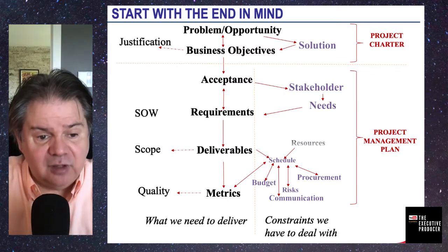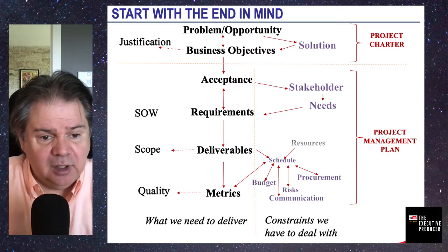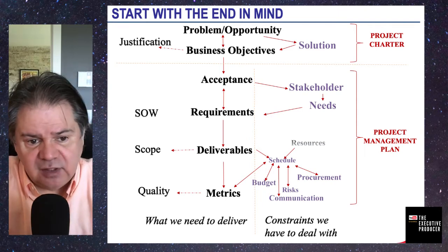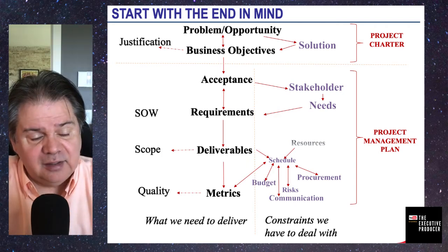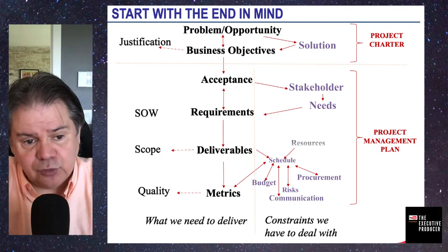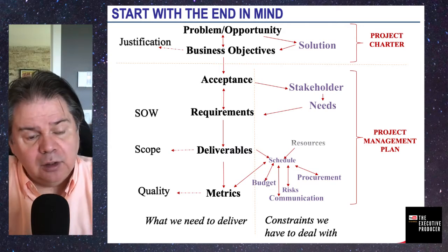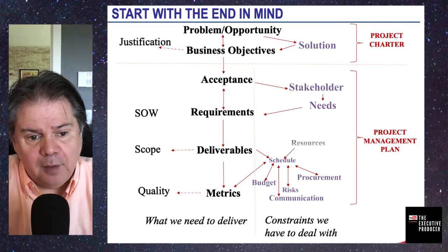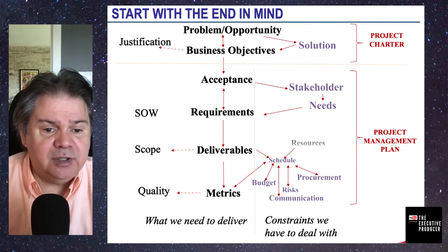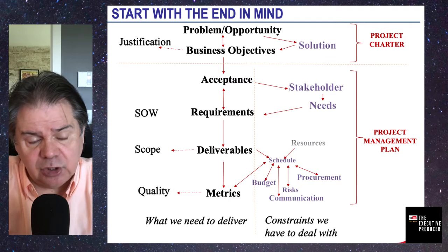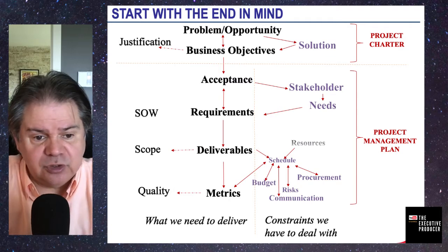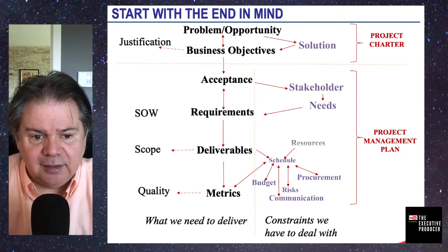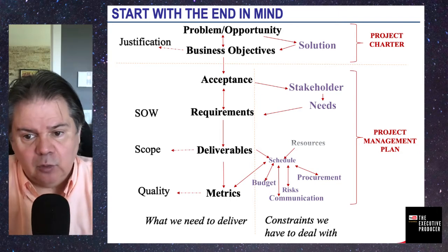So now what I need to identify is how I'm going to be delivering this output, and that's what the schedule is, okay? A series of activities that we need to identify. Activities take time, you use resources, and we will map these activities and put in the dependencies. After that, we will be able to assign resources to them, then establish effort and duration on these activities based on the resources that we have, and then come up with a network that we could look at and find what's critical, what's not critical.